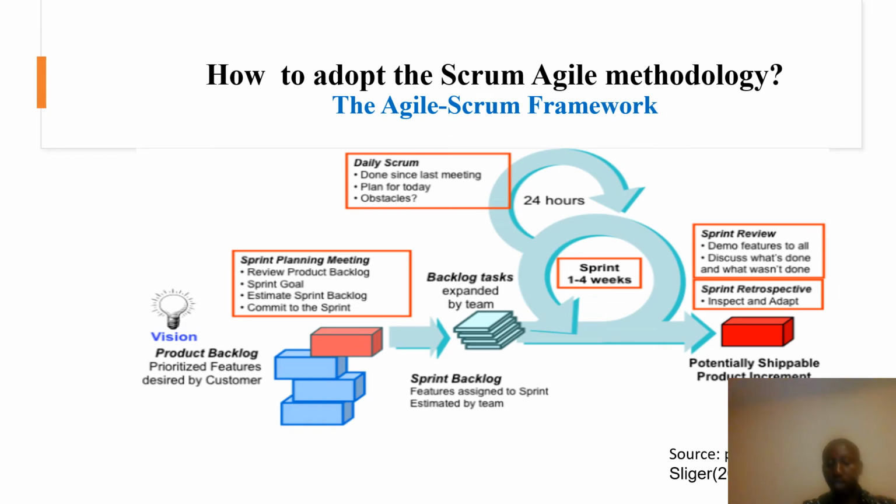During the sprint, the team checks in daily with each other in the form of a 15-minute meeting known as a scrum. The team stands in a circle and each member states what they did yesterday, what they plan to do today, and what is getting in their way.